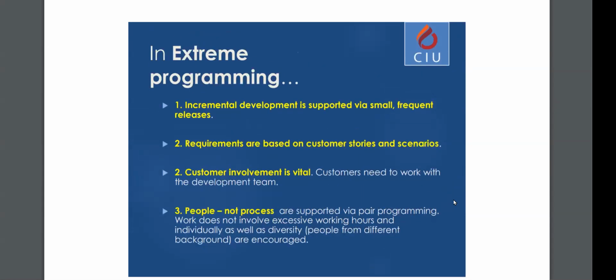So what do we know about incremental extreme programming? Incremental development here is a practice we can use in extreme programming, which is very well aligned with how it works because you're going to deliver the software in smaller versions anyway. You're going to deliver with frequent releases, and you're going to limit and stick to that release time. Let's say 3 weeks or 4 weeks, whatever you come across with.